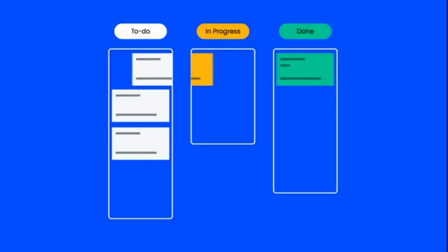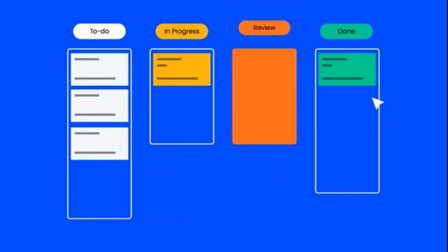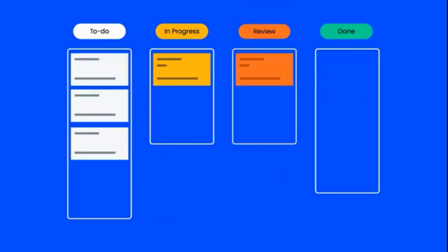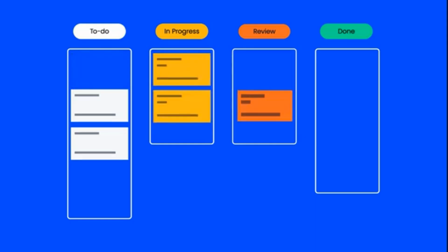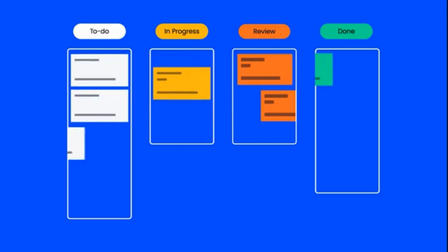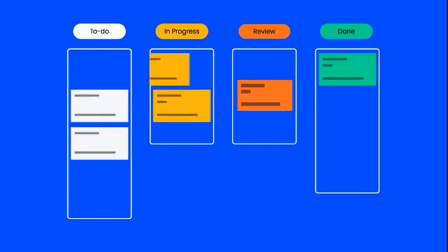The intention is to have only a single task being worked on at once by any individual person, and that task should be completed in its entirety before moving on, at which point it will be moved to another section for review or testing. Once a task has been completed, reviewed, and/or tested to make sure it is sufficient, only then is it moved to the completed section.